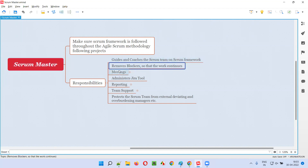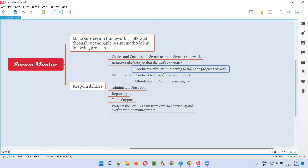Scrum Master will look into the blocker and make sure it gets resolved by taking the necessary actions so that work continues in the project. Scrum Master will also conduct the daily standup meeting, or daily Scrum meeting, throughout the sprint to track the progress of the work. This meeting is held at the same time, at the same place, for 15 minutes every day.